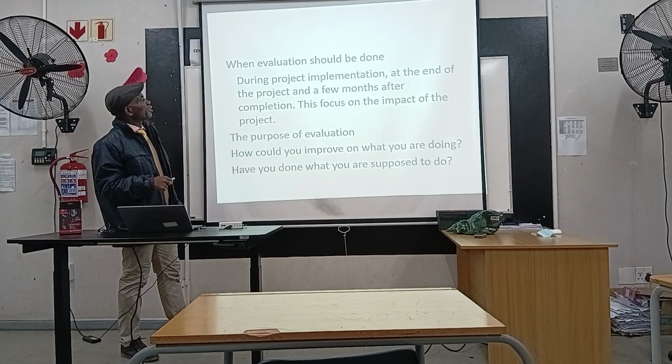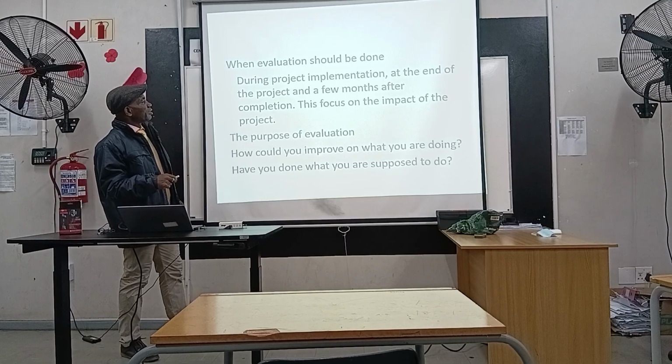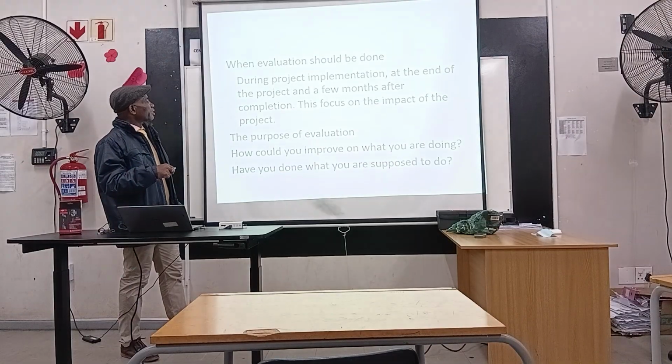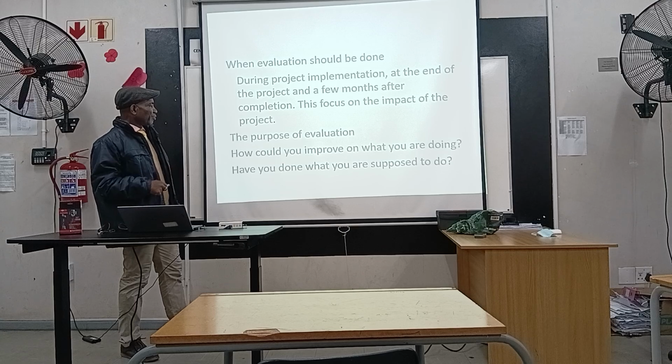So essentially, you have three times in which you need to carry out an evaluation in a project. As we said, the first one is during the implementation, the second one is at the end of the project, and the third one is a few months after the completion of the project, which is another word for it, postmortem, right? The type of evaluation done a few months after the completion of the project focuses on the impact of the project.